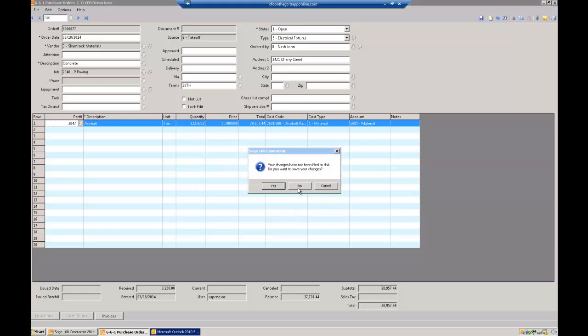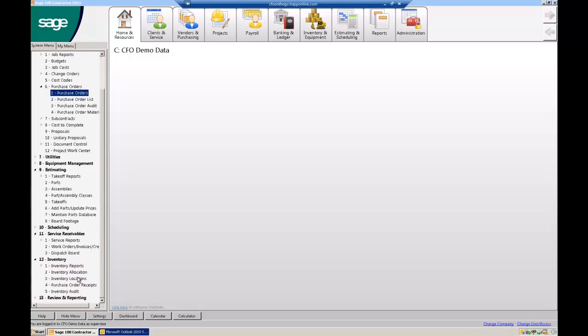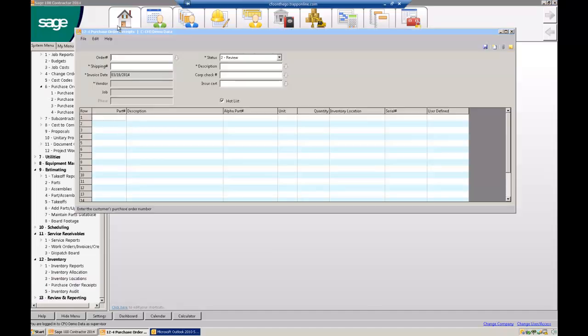So at the end of the day, or the next, I would assume the next morning, somebody will have a stack of tickets from the job, and they're going to come in here. And I think you said you used the last 5, 6s in there. Yep. And then you use the last shipping ticket, so we're going to say that's 88, something like that. And yesterday we had received, let's just say 158 tons. Okay? That's what they received on that date with that shipping ticket number on that purchase order. And we can change the description. I'm going to save this real quick.